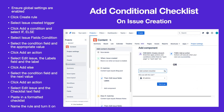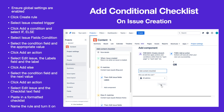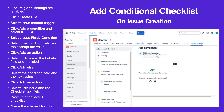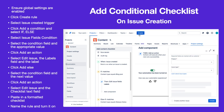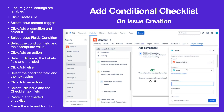Name the rule and turn it on. When an issue is created, the appropriate checklist will be added depending on the value of the condition field.